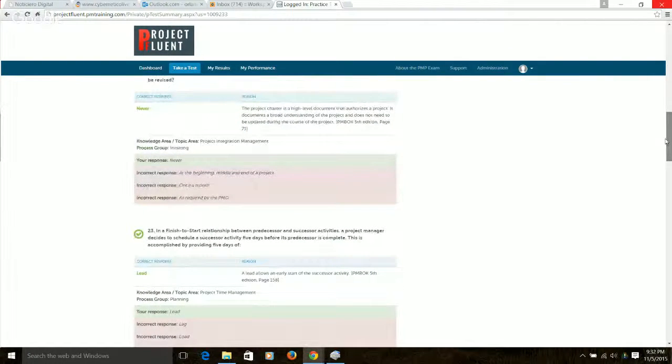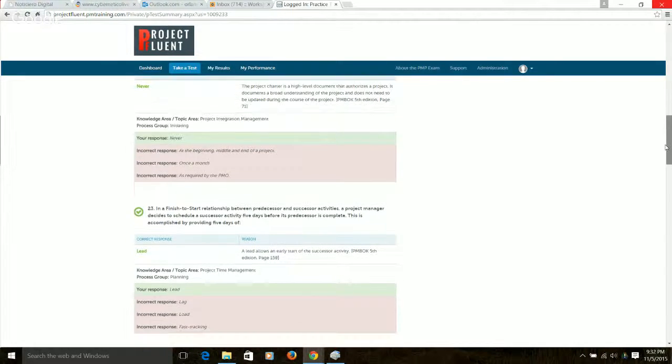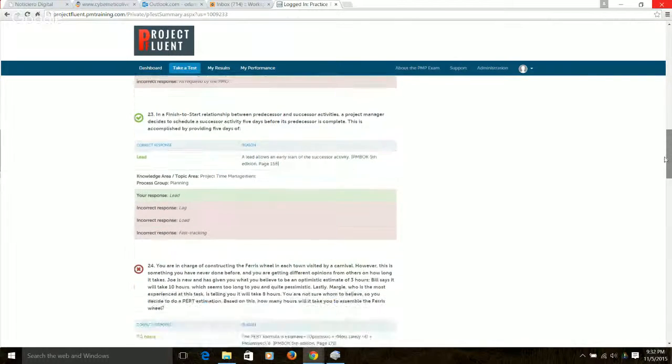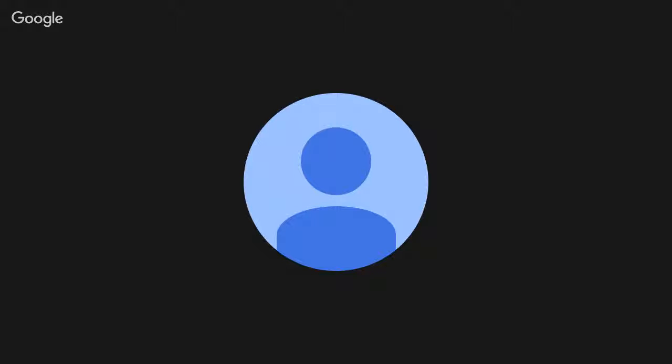In a finish to start relationship between predecessor and successor, the project manager decides to schedule a successor activity 5 days before its predecessor is complete. That's providing 5 days of lead. Yes, it's lead and lag. See, I did learn something.